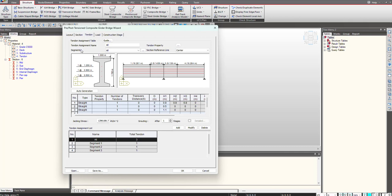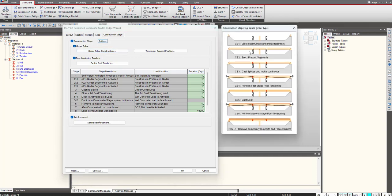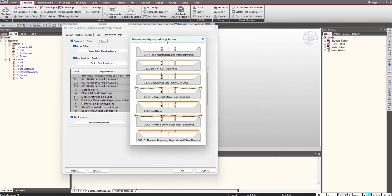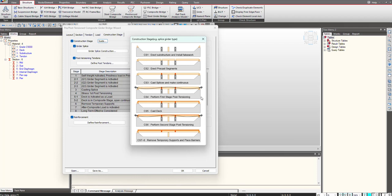Then the major part comes, the tendon definition. Here we need to focus on when dealing with splice girder bridge and the construction sequencing. This will give you a clear idea how the splice girder construction is done. First the substructure is erected, then we erect the precast segments and you can see the gap between them. Once these are erected, we can have the splices, we can cast these splices and make it as continuous. And after that we can perform the first stage of post-tensioning.